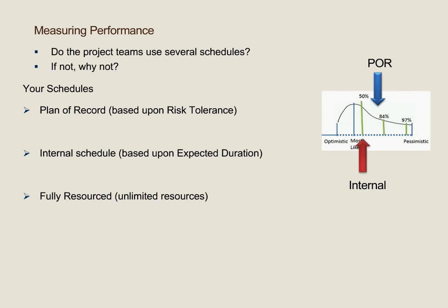The fully resourced schedule reflects what resources the project would need if it was going to be given top priority. When things go wrong in a project, it is not unusual for senior management to turn to the project manager and ask, "What do you need?" As the project manager, you want to be ready to answer that question instantly.